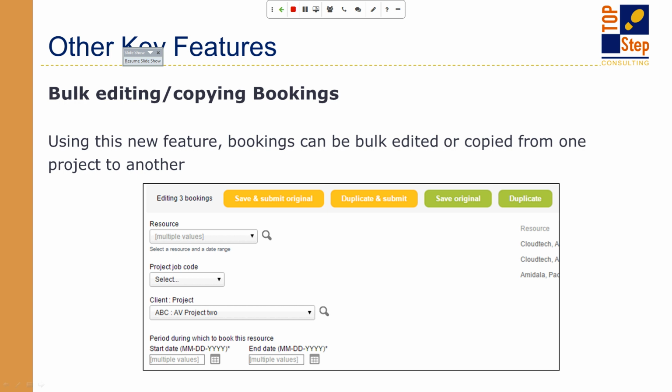Well, use your filters. Isolate all of the bookings for that time period for resource A. Click a button. Select the new resource from a drop-down. Hit save. Suddenly you've updated 10, 20, 1,000 bookings at one time without having to click into each one, or without even having to go into the planner, without having to open up a workbook and click each cell. It's really powerful. You can grab a bunch of bookings. You can move everything out for a predetermined number of days. You can change, like we mentioned previously, you can bulk update the booking type.